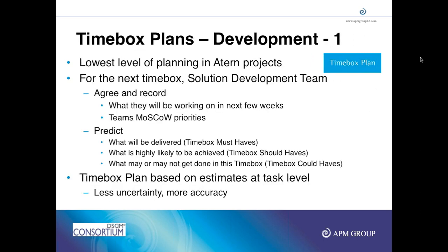Time box plans, on the other hand, are prepared by the teams, the solution development team. What they do is they take up the requirements, they take up the delivery plan and look at it, and then during the kickoff of the time box, they look at objectives, expectations, and they check the team availability, bandwidth, and the tasks.